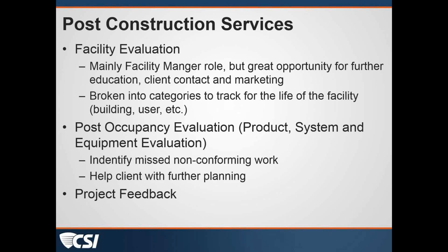I have seen some owners, and this might be something you want to talk with your owners about, not only having a trigger point being substantial completion, but have a different trigger point being final completion, so that maybe there's a different, lesser liquidated damages amount that's charged for every day past the date that should have been set for final completion.